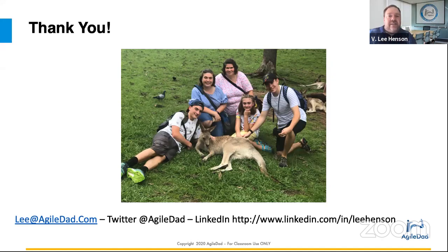So there's lots and lots of good information there. How do you overcome a budget estimate of traditional projects? I don't. What I do is use the budget and the team's cost, the cost for a function of the team, and forecast out. If I have a budget of this much money and this much operating cost for the team for this amount of time, I'll use that to forecast how much of the team's time I have to dedicate towards this project. And of course, if you're in leadership, you can subtract out profitability and things that you want to earn from the top. That way you can forecast and get things locked in there.